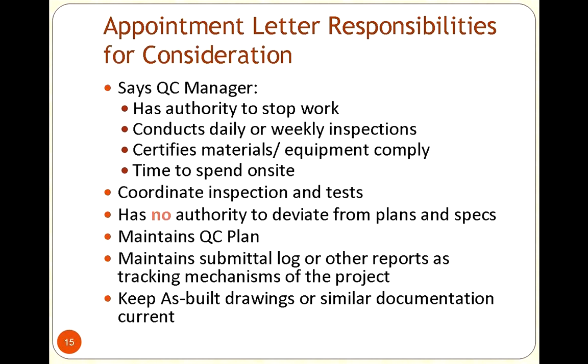into the letter. We would have that letter say what they could do as far as inspections with when they're going to do them, how they can do them, making sure that they're actually on site every once in a while. That would be one of the responsibilities, is sometimes you're going to have to shadow someone or check up with them on their work. Coordinating any of the testing that has to be done, but they don't have the authority to deviate from those plans and specifications. If you see a problem, you can say stop.